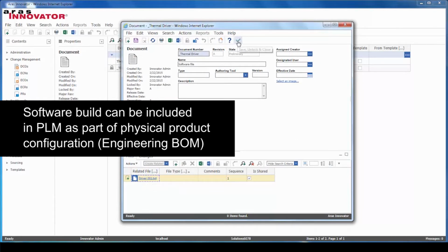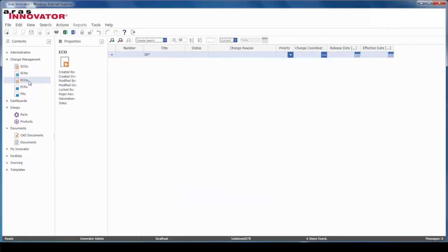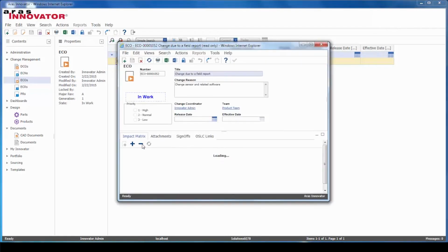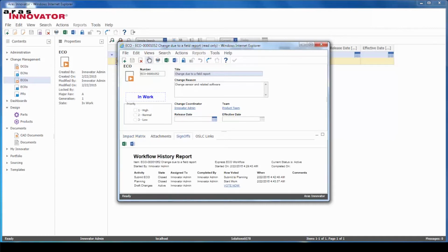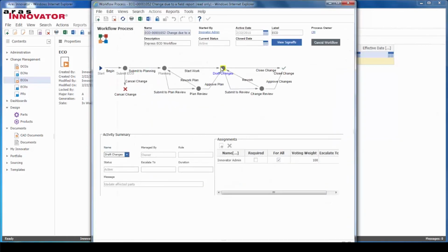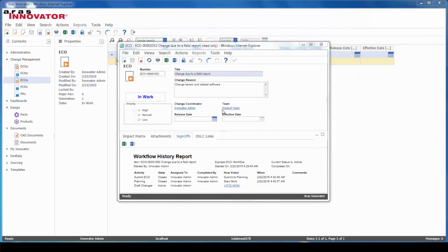The PLM ECO workflow waits for all tasks to be reported by engineers as completed. ALM systems engineers update all related tasks in PLM as completed as well, in addition to doing that in ALM. Once all is done, the PLM ECO process transitions affected assemblies and parts to the released state.